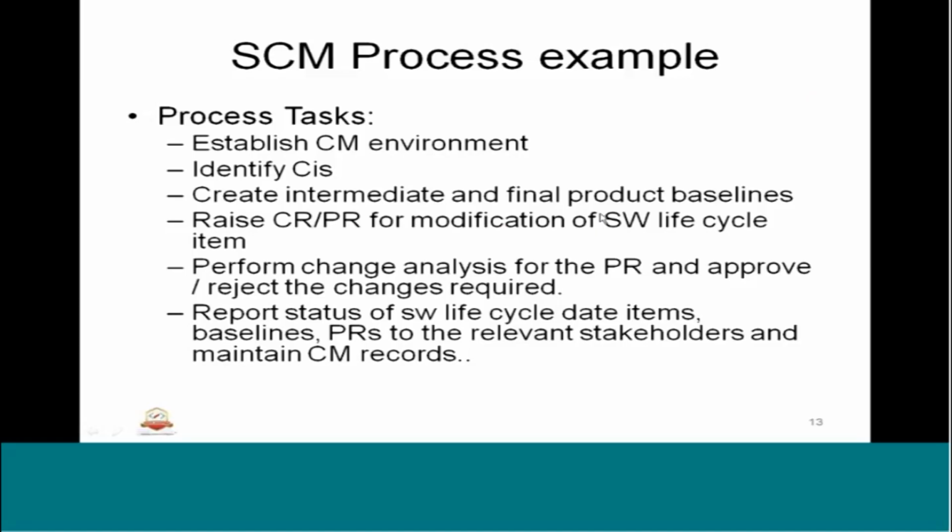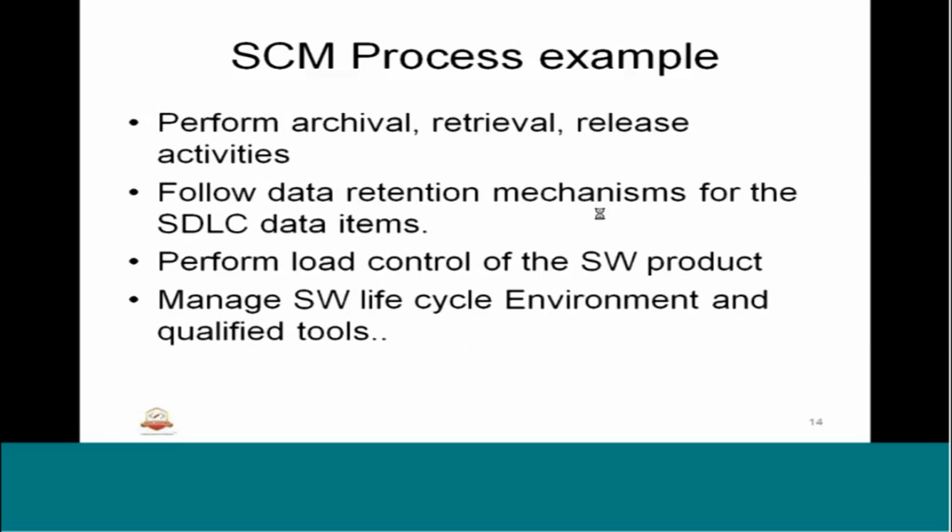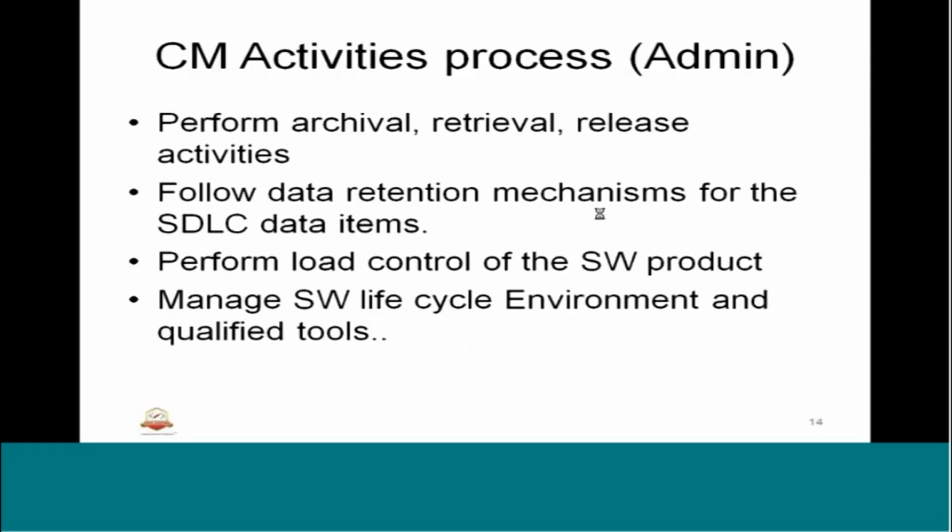Okay, so next, CM activities from the admin perspective. As I said, the admin could be a change controller or a dedicated change controller could be there. Admin can be different, but in most mid-size projects, the admin and the change controller will be the same for the particular project. So what he does is perform archival, retrieval, and release activities. He follows the data retention mechanism for the SDLC data items.